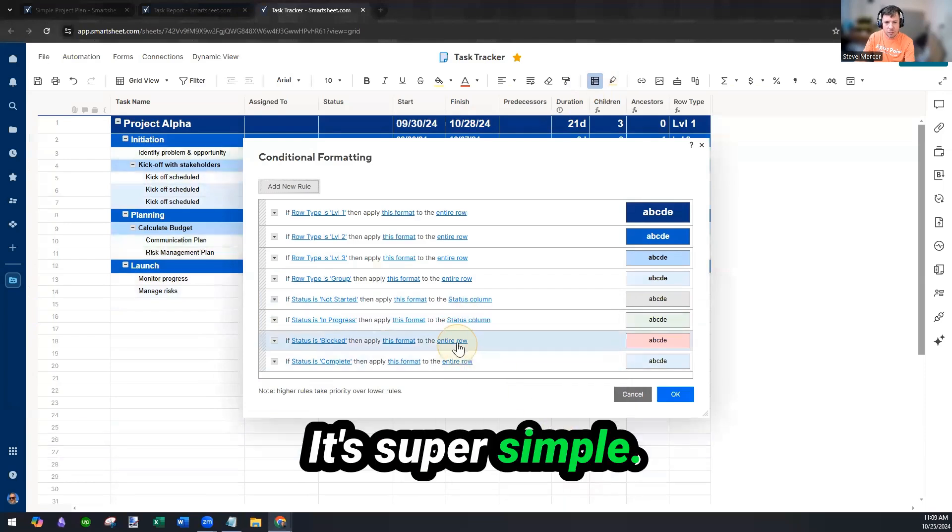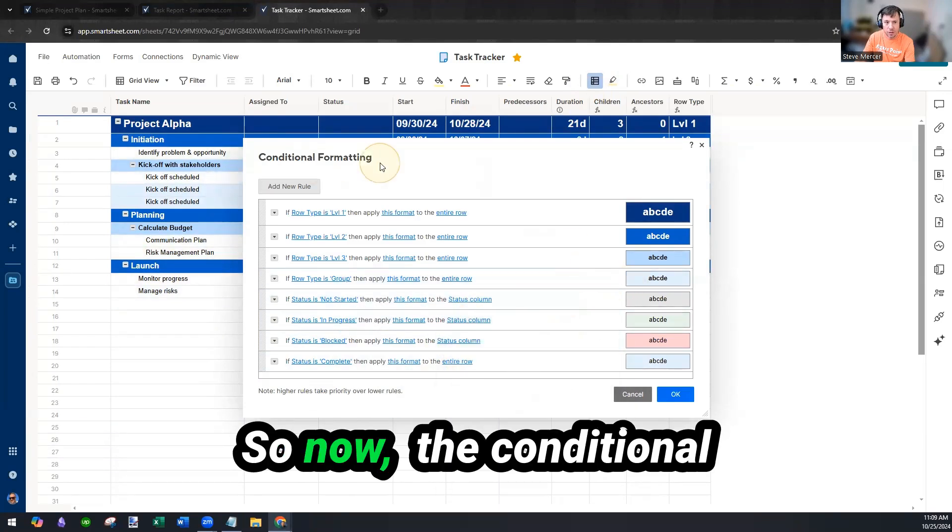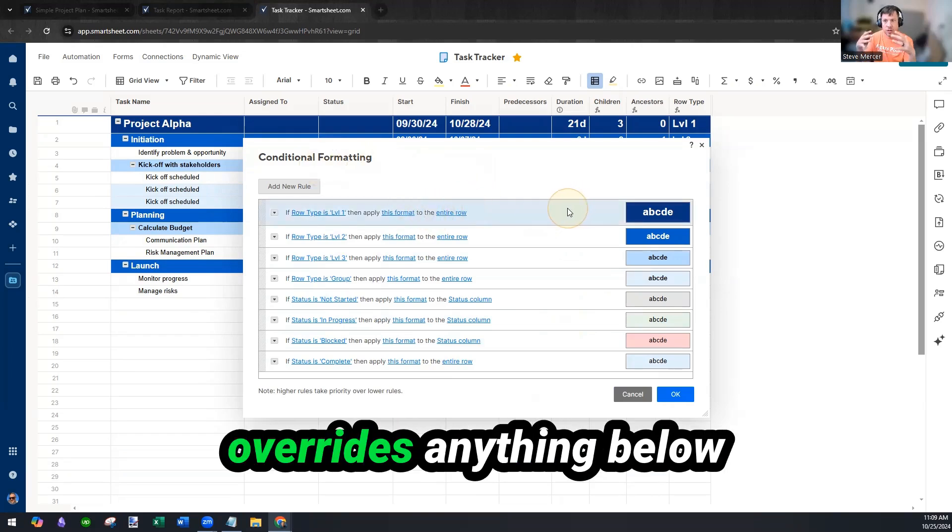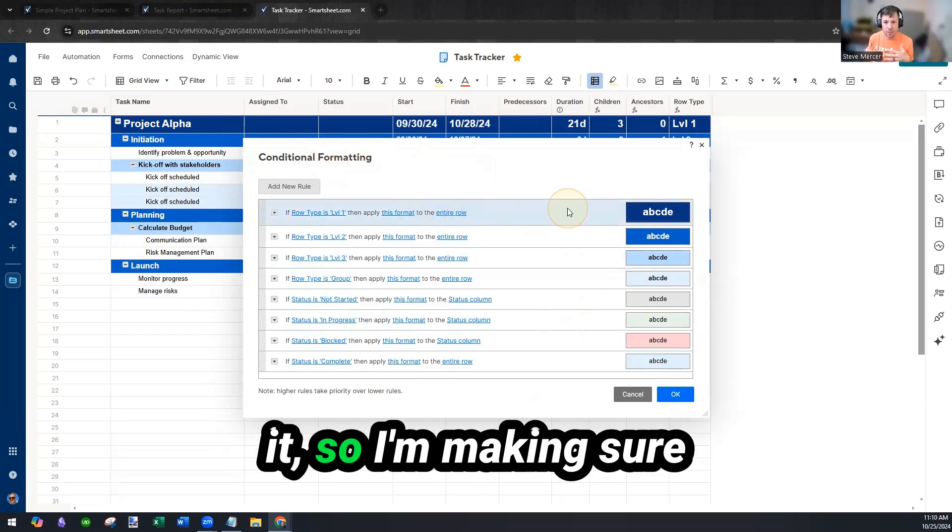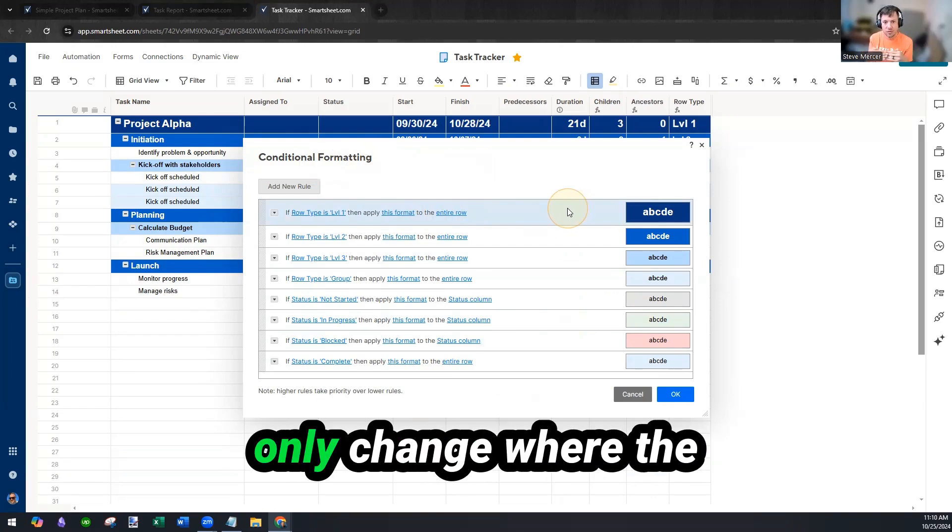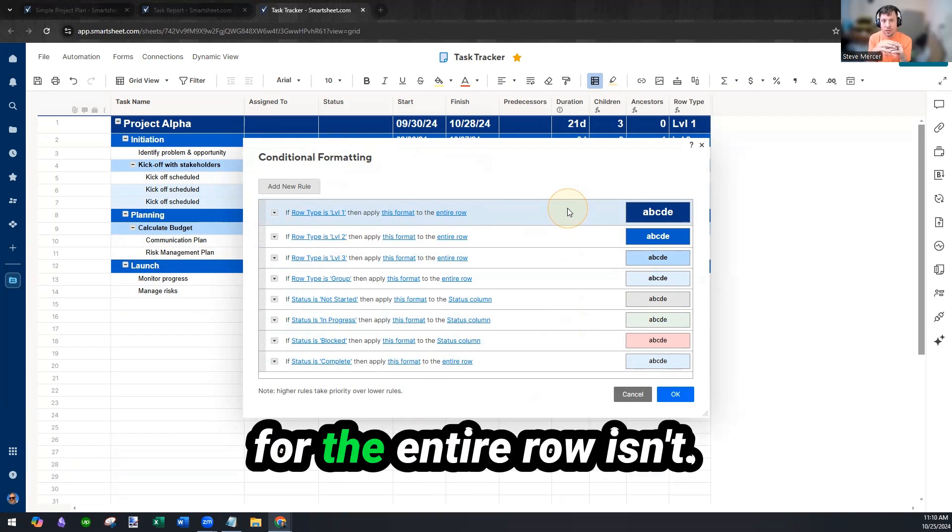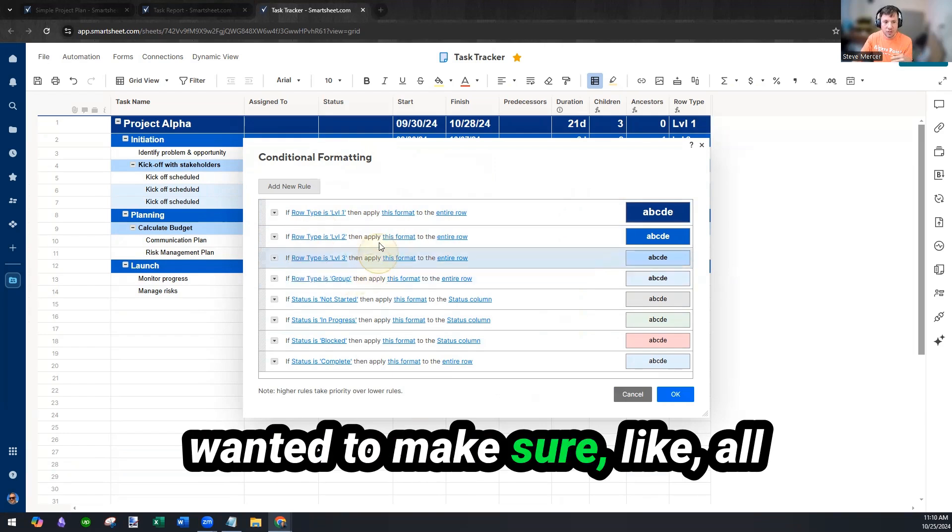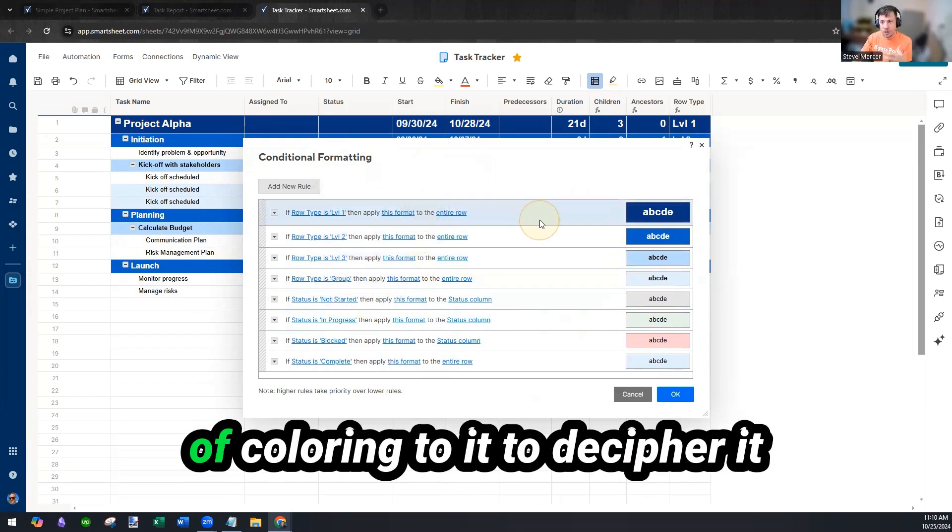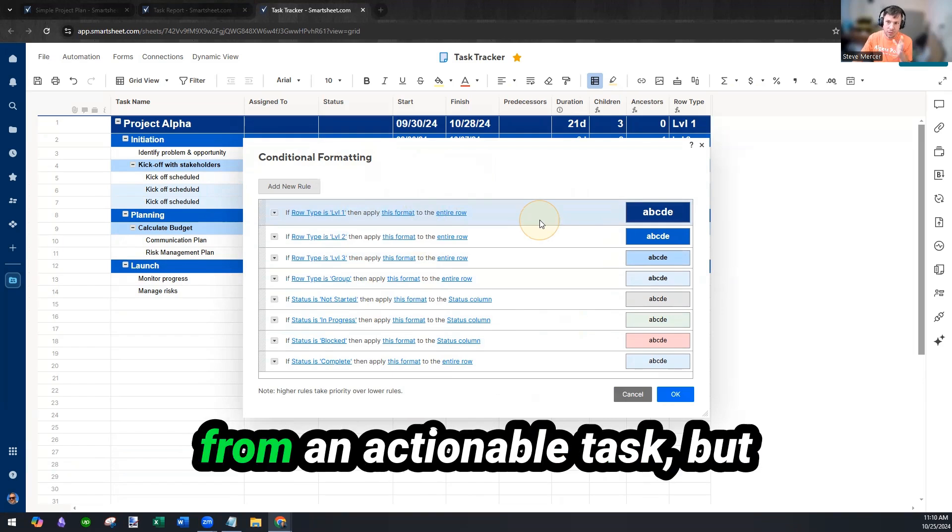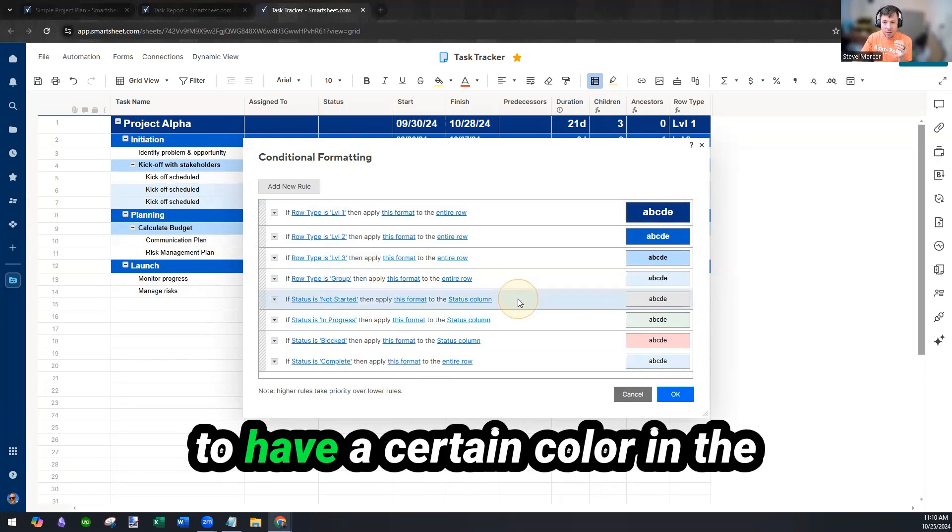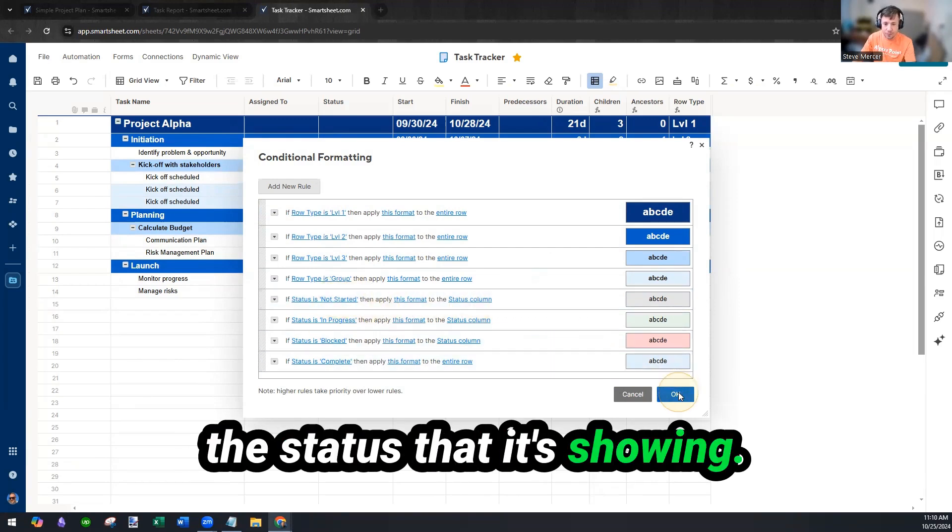Super simple. So now the conditional formatting, the top rule overrides anything below it. So I'm making sure that the status columns only change where the conditional formatting for the entire row isn't. In the previous video, we wanted to make sure all the groupings had some sort of coloring to it to differentiate it from an actionable task. But I want these actionable tasks to have a certain color in the status column based upon the status that it's showing.